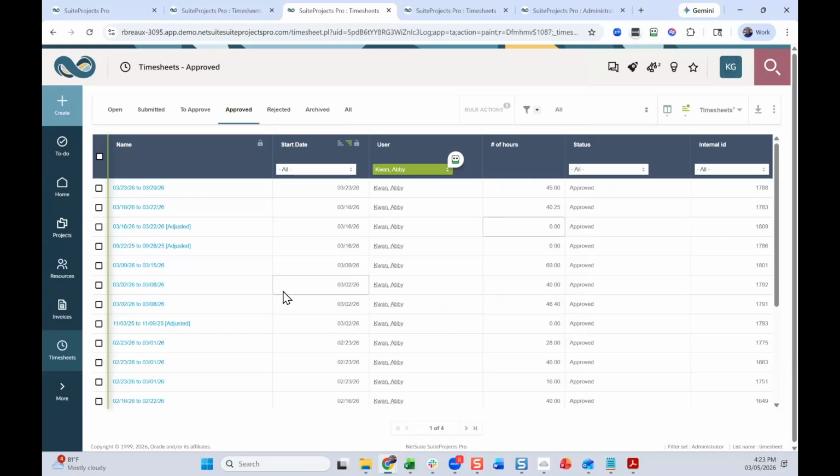And what that script will do is you'll give you a template in a spreadsheet where you'll say time from and to. You'll put in the requisite information, upload that CSV file into a workspace inside of SPP, and then a script will read that file and it will move the time for you.